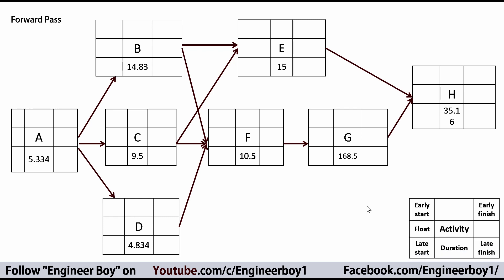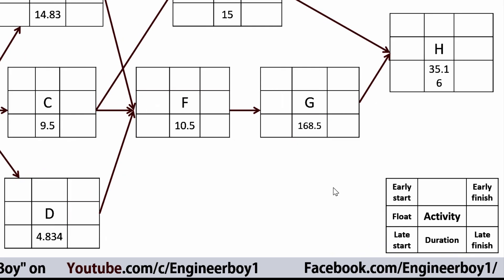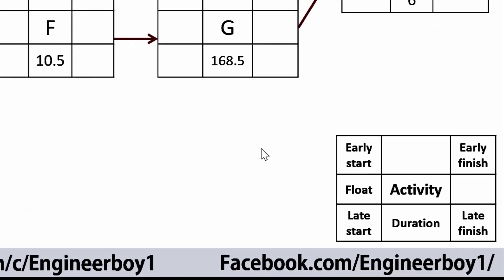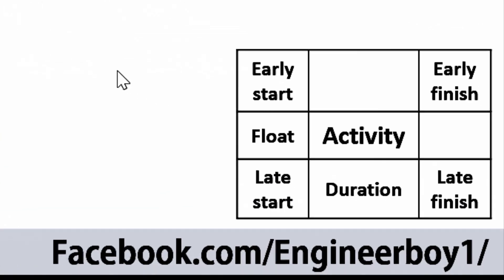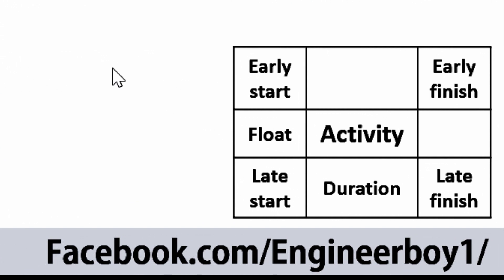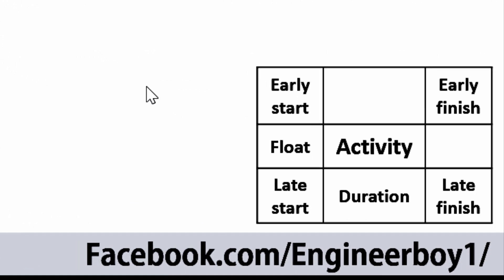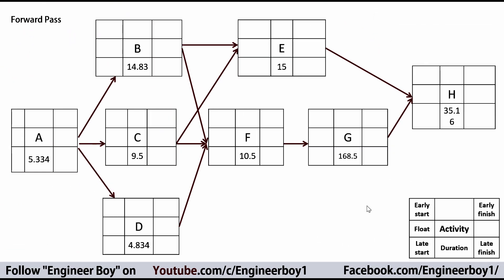Now I'm going to calculate the forward pass. For this approach I'll use the annotation: early start, early finish, late start, and late finish. The center boxes are the activities like A, B, C, D, and below them are the durations — these are the mean durations.